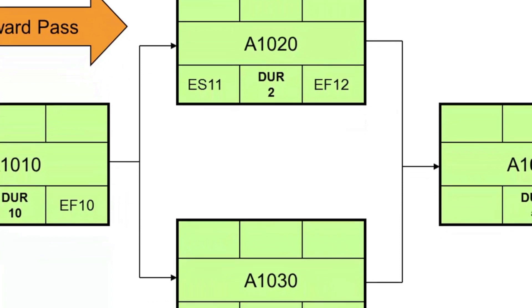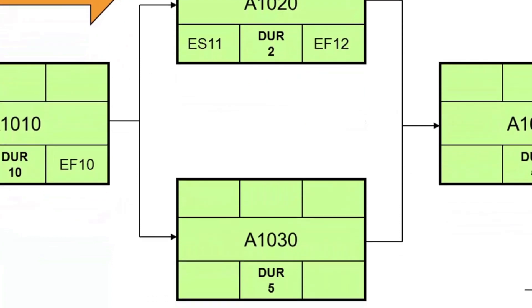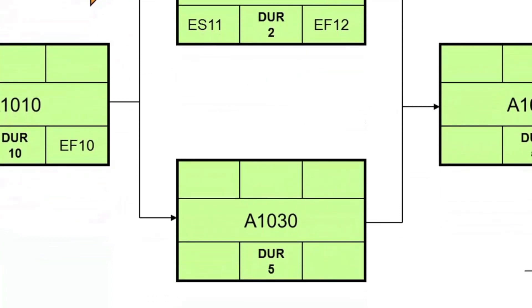Next, we look at A1030. This will also get an early start date of day 11. It has a five-day duration, and so will have an early finish date of day 15.